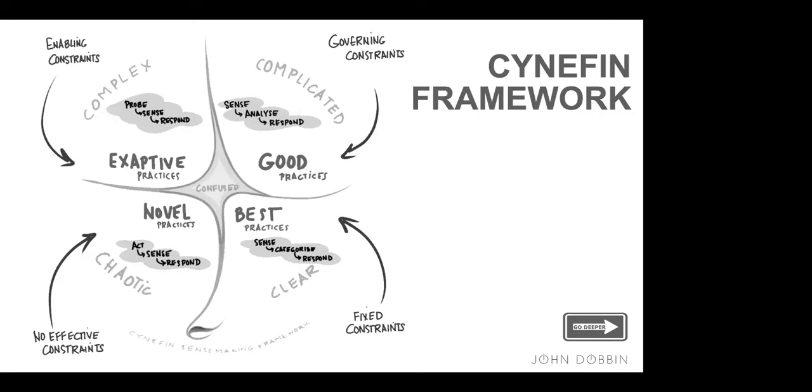Now, there's a thing called constraints, and in this particular domain they are called governing constraints. The best way that I can explain a governing constraint is to think of it as a scope of work. We're saying our job is to put single sign-on on, and it's going to take this many hours and this many dollars, and that's a constraint that we have to work towards.